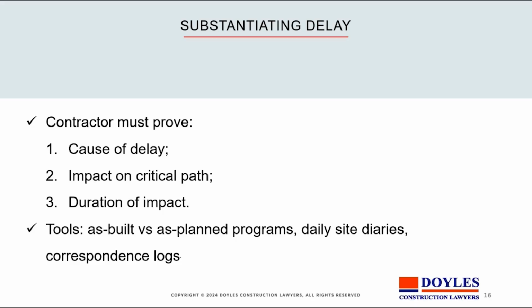The impact on the critical path should be measured. So you should have an argument as to say, well, there's a flooded trench. That meant I couldn't get the crane into the building. That meant I couldn't lift the stores that I needed for the installation of the air conditioning.